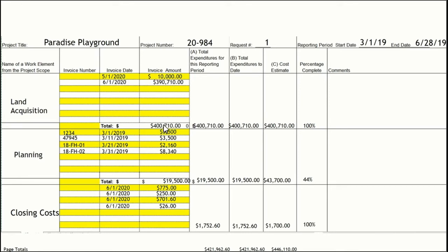But those added together come up with the sale price that you saw on the closing disclosure statement. Also notice the $2,394.25 in taxes that were highlighted in blue on the disclosure statement are not included on the DER. This is because PARTF does not cover taxes.